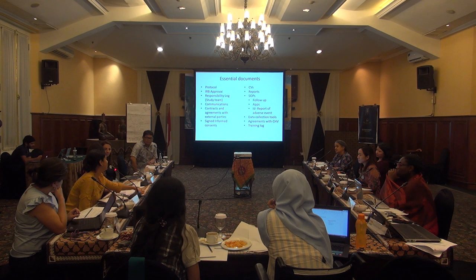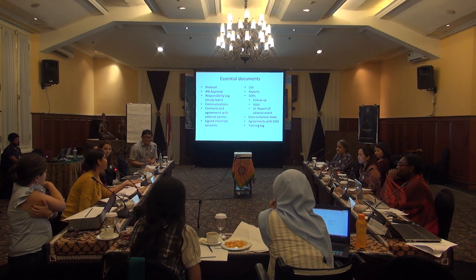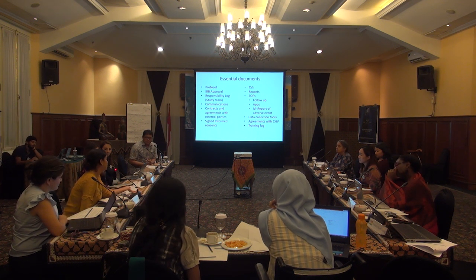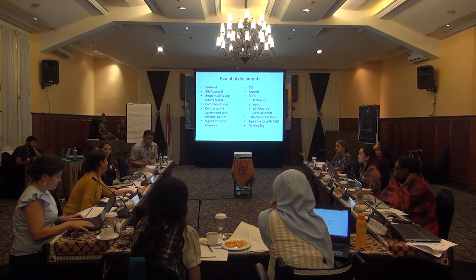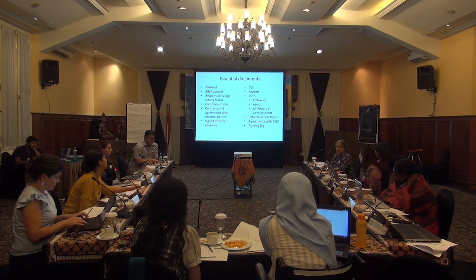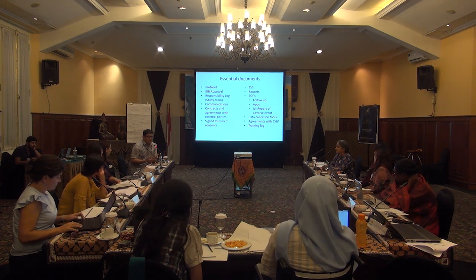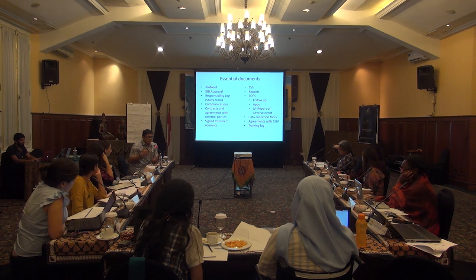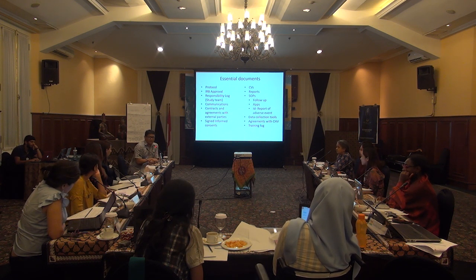So it is also not a simple thing to design, because we thought that was something very straightforward, and everybody understands how a database should look, but no. And then when the engineers that developed this exported the data, it was like, how can we analyze this thing? So in the piloting of this, it takes a lot of time to get it running. It's not simple. And you need to have SOPs, because data loss or problems with the apps can happen at any time, and you need an SOP for when you should switch to paper-based data collection. Or in your case, what's the situation?